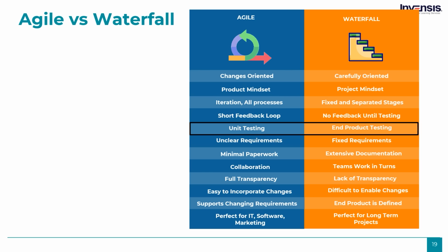One more difference between Waterfall and Agile is their individual approach towards testing and quality. According to Agile, testing is usually performed concurrently with the development phase. In Waterfall, the testing phase comes after the build phase.